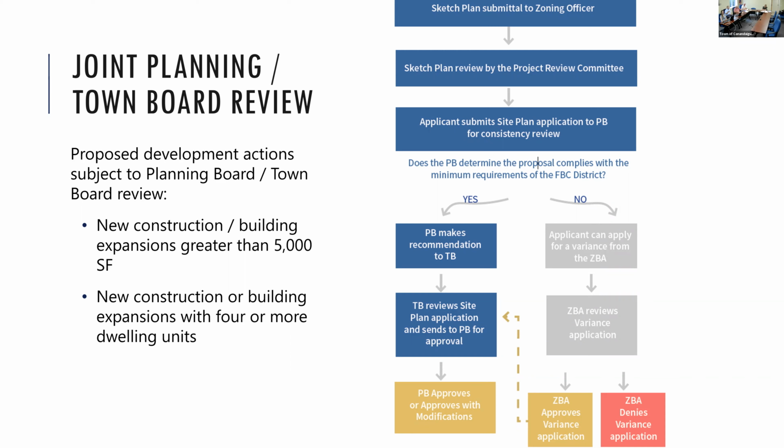But to get back to Gary's point, PRC will provide that information to you, and they do that now. But technically, even now, on an application, PRC doesn't have the authority to determine whether or not the application is complete. And I know Chris Nadler and I just had this conversation recently. Technically, we don't even want the planning board to make a determination that the application is complete until you're ready to take action on it. That includes the completion of SEQR. Once you say it's a complete application and SEQR has been completed, that's when your clock starts under the general municipal law. So that's why we do it specifically like that.